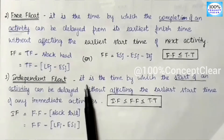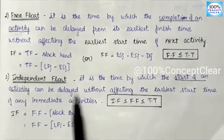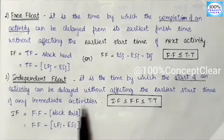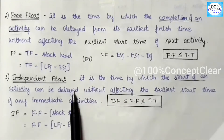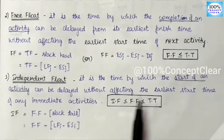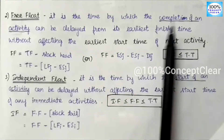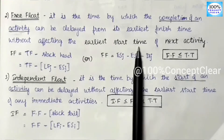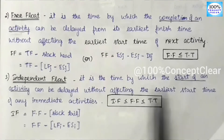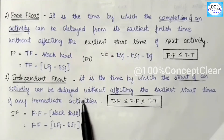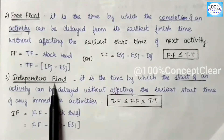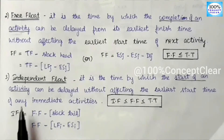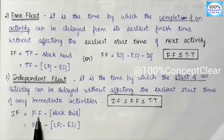The next float type is Independent Float. It is the time by which the start of an activity can be delayed without affecting the early start time of the immediate following activities. The formula for Independent Float is: Free Float minus Slack Tail.